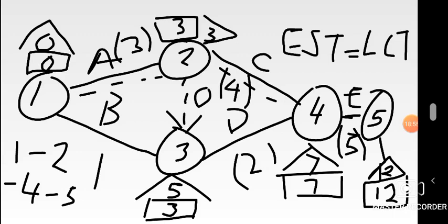What did we say at the beginning? The critical path is always the longest route in a network. So you have 3 routes as we're trying right now. 1, 2, 4, 5, the one we even selected, has given us 12. You're adding the numbers along the routes. Try this other route, 1, 3, 4, 5. There's a 1, there's a 2, and there's a 5, giving me a total of 8. Remember, we have 12 already. Now 8. The other one, using the dummy route, there's 1, 2, go to 3, 4, and 5.